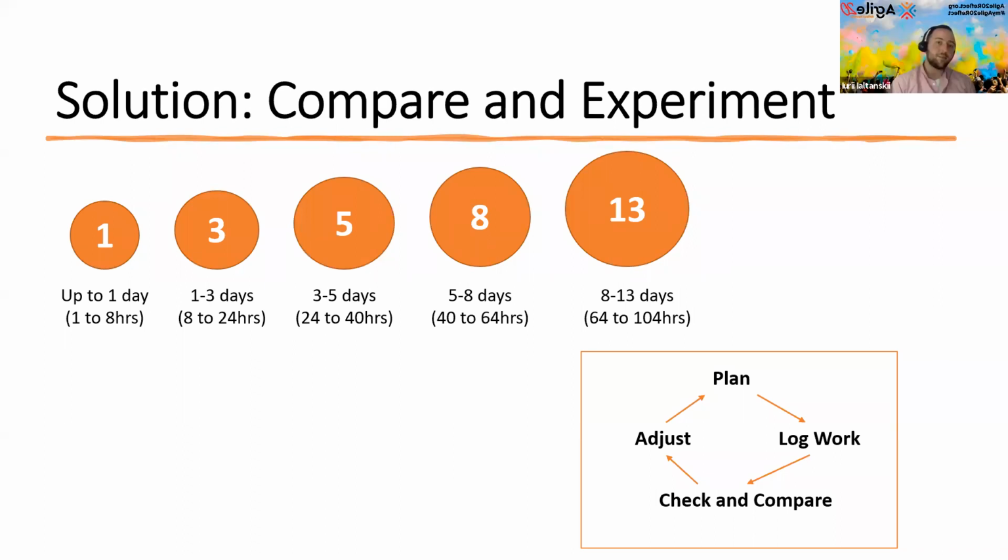That's right. In fact, this is just working hours. So a normal work day would have 8 hours of work, right? So these hours we estimate using these hours. But in this case, we should pay attention to the engineer's work logging, right? Because, for example, some newbie junior developer starts working on an item, and it just keeps going and going, but doesn't log hours.